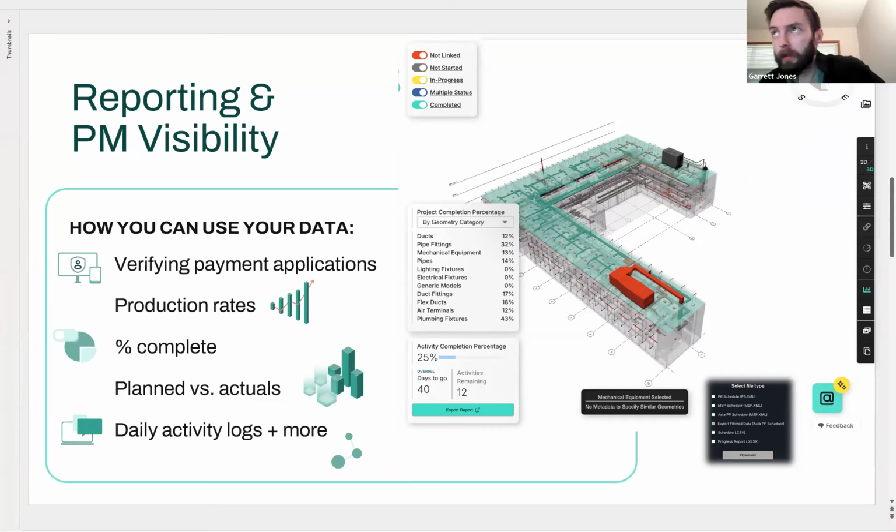One great example is from one of our very first customers. Prior to using our tool Progress, they were doing manual walkdowns and updating spreadsheets at the end of the week using highlighted drawings that then got manually translated into an Excel table for progress tracking. By the time management received this update, field conditions had changed and the impact of issues had been realized. It was all reactive. And so, if scope required verification, additional effort would be needed to gather more field data, creating a vicious cycle of feedback that was always behind the eight ball, limiting the impact you could have understanding what's happening in the field.